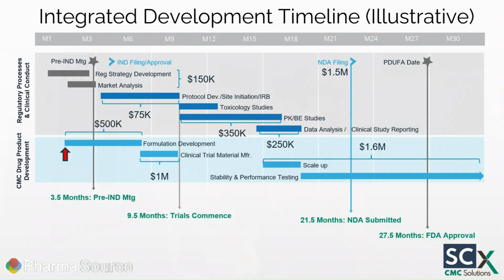I've worked on several different pitch decks, many more than that. And there's always an integrated development timeline. This is something that typically I will be responsible for putting together, at least for the formulation development, CTM manufacturing, and CMC activities. We talk about budget and timeline. And just like any other timeline, typically you start at the end and you work backwards.